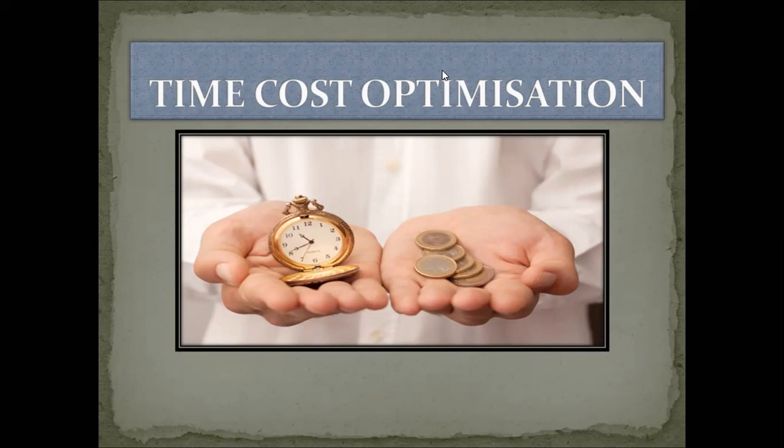Okay, if 15 laborers are working with you for, suppose, 2, 3 or 4 months, then 45,000 per month multiplied by that number of months. Suppose it is for 4 months, then that comes to 1,80,000 rupees. So that 1,80,000 is the increased cost.